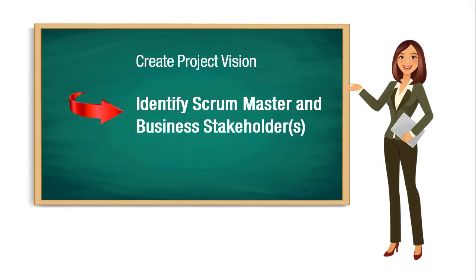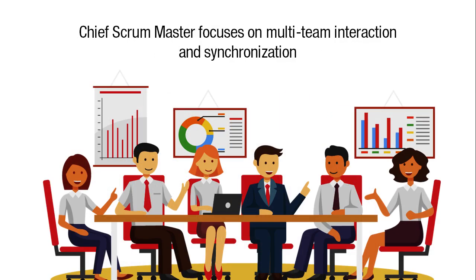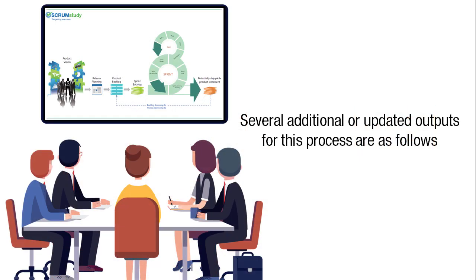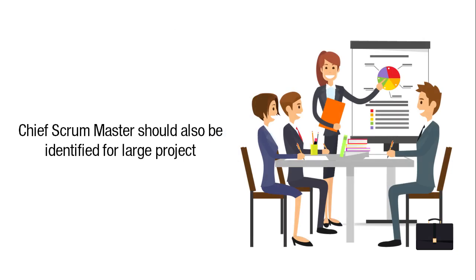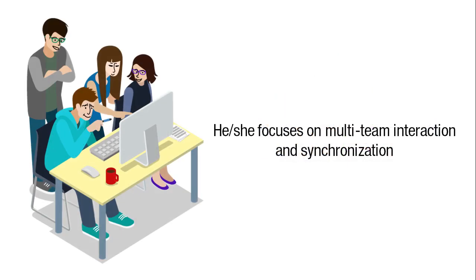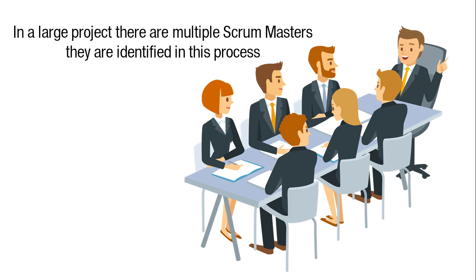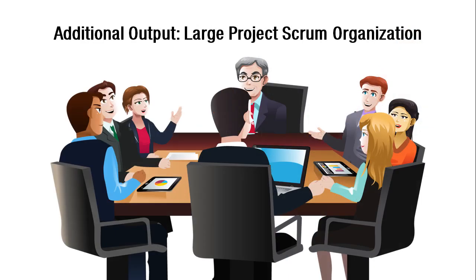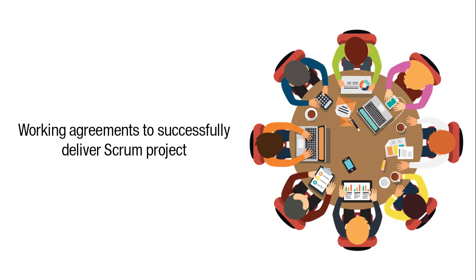Identify Scrum Masters and Business Stakeholders is the next process. A chief Scrum master and additional Scrum masters are identified in this process. The chief Scrum master focuses on multi-team interaction and synchronization. Additional outputs for this process include: identified chief Scrum master — similar to the chief product owner, the chief Scrum master should also be identified for a large project, focusing on multi-team interaction and synchronization — and updated identified Scrum masters, since in a large project there are multiple Scrum masters. An additional output is the large project Scrum organization, as it will be essential for the entire large project team to embrace a common understanding of Scrum and working agreements to successfully deliver the Scrum project.